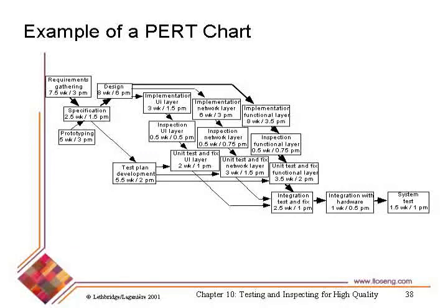Now, I'm not going to go into the intricacies of the PERT chart, but it is an extremely important management tool because it shows you the dependencies. It shows you that if I, for example, miss my deadlines on things in some paths, that will hold up things that are subsequently in the path. And the shortest path, possibly through the system, is often shown on these diagrams. Here I'm showing it as a bold line, the bolder arrows here. It's called the critical path. And if you are held up in any of those tasks on the critical path, your final deadline won't be met. A very important management technique.